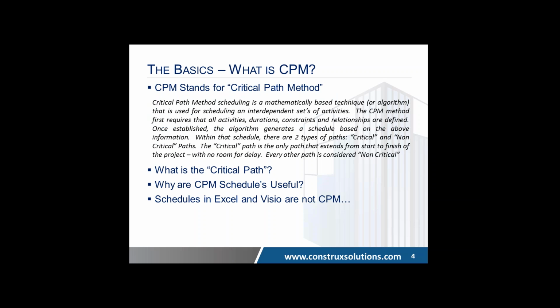That's what CPM stands for. Basically, critical path method scheduling is a technology. It's an algorithm within a software that ultimately takes your activities, assigns calendars, assigns durations. You can assign resources, but ultimately, most importantly, is the duration, is the calendar that it's sitting on. What days can you work? What days can you not? Usually, a 5-day-per-week calendar is pretty normal. A 6-day-a-week calendar is common too.